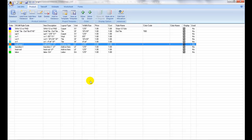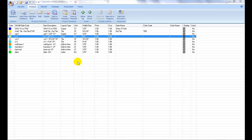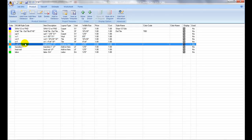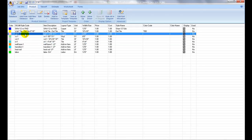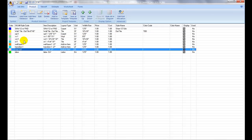Add-on Association: In floor estimation, installing major covering materials requires add-on items as well as labor costs to get the job done. MeasureSquare allows you to associate the add-on item with the major covering material.